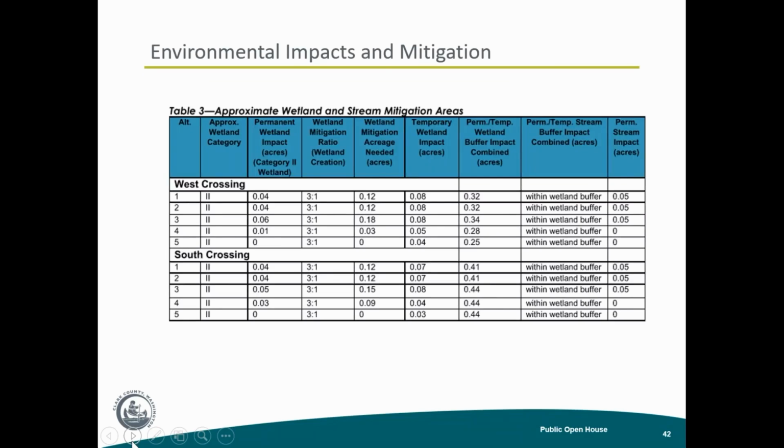To mitigate for that, there's a requirement that we mitigate on site with plantings and stream restoration, up and down and above the roadways, and then also on an off-site mitigation bank, we are going to do some planting to compensate. And there are ratios, like 1 to 4, whatever they are, for these different impacts. So that is the plan for mitigation.